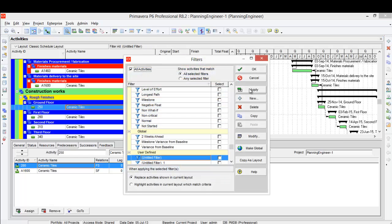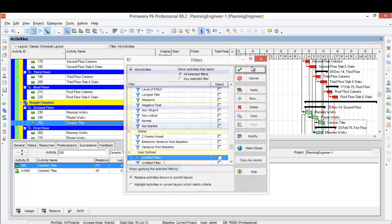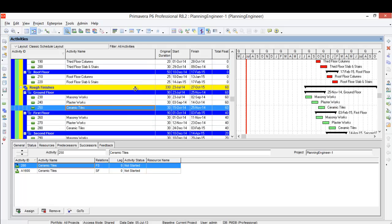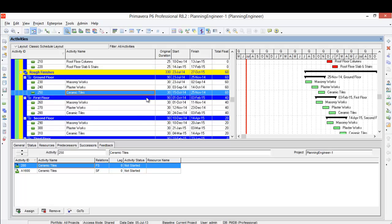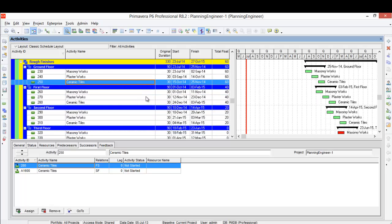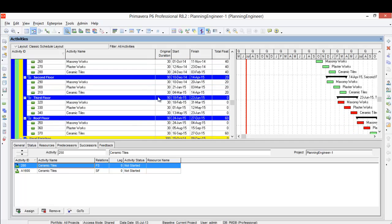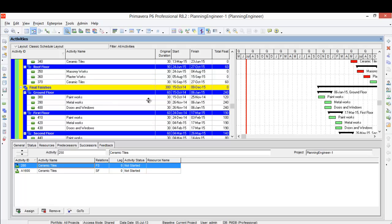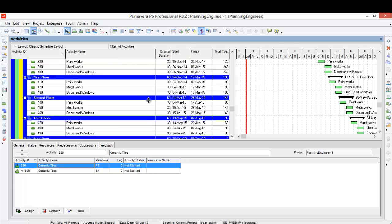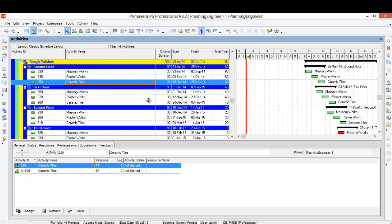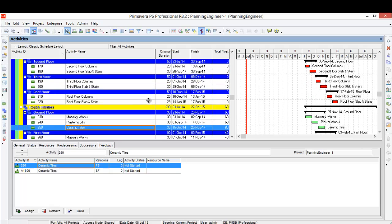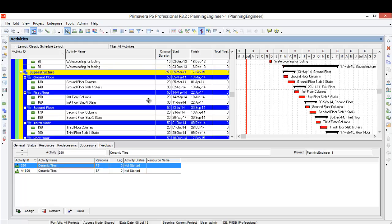So the first method to fix the float is to link the activity by floor. The second method to fix the float is to link the activity to another activity - let's say to link the ceramic tiles to the painting or something. So it depends on actually the program itself and how you program your schedule. And by the time when you use to do these schedules, you will know from the beginning how to avoid these wrong floats.